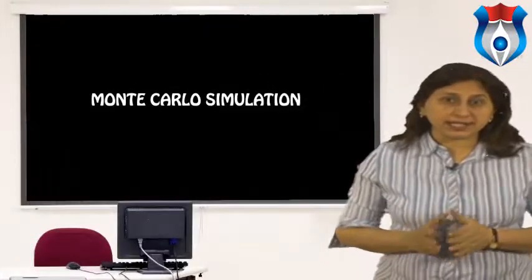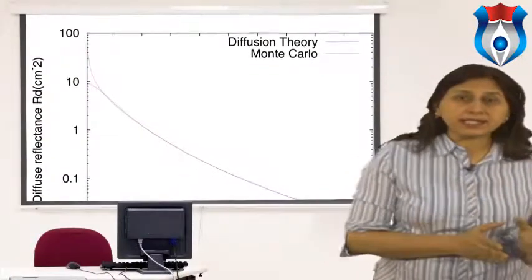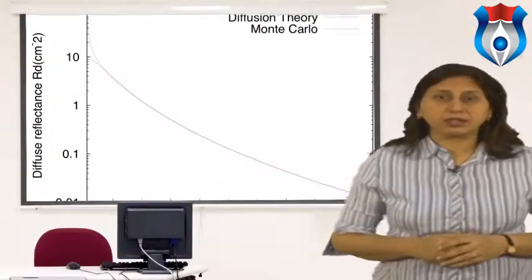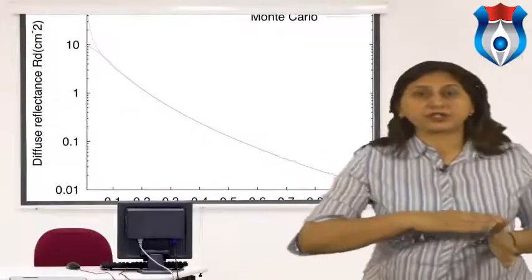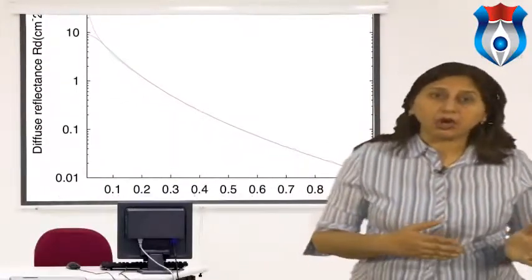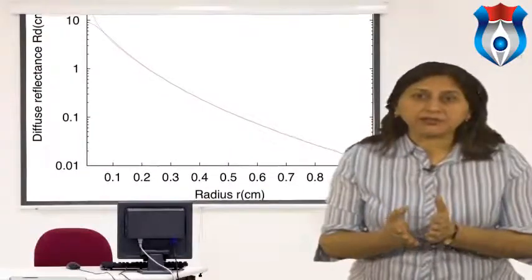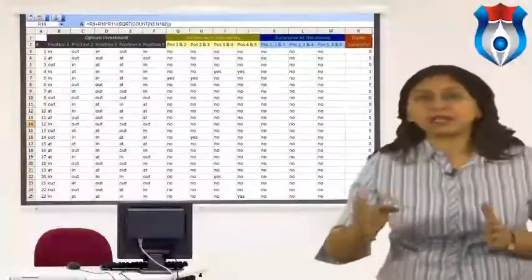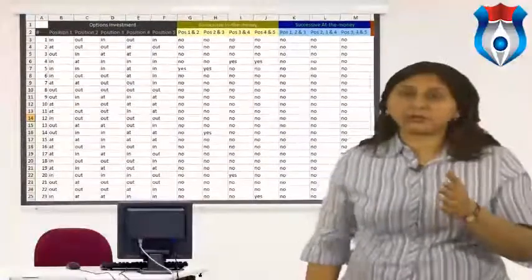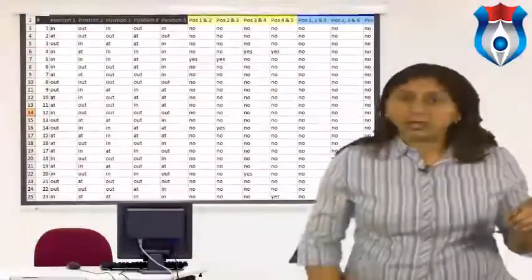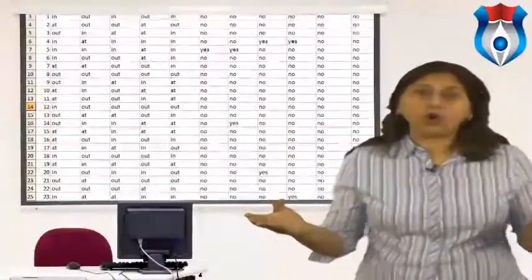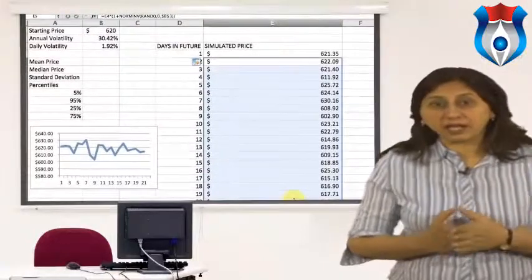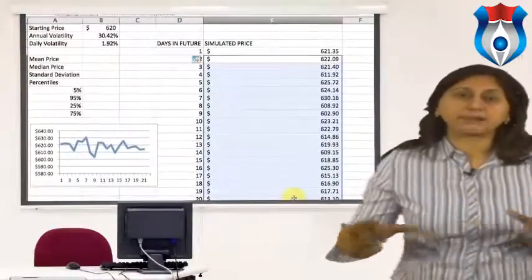Monte Carlo simulation is a technique used to determine the probabilistic distribution of an outcome that relies on all probable scenarios. Monte Carlo sampling refers to the traditional technique for using random or pseudo-random numbers to sample from a probability distribution. It is a method of recognizing and determining risk. Monte Carlo simulation produces not only one answer, but rather a series of answers or a range over which the results vary as a function of probability of occurrence, and also a most expected result.